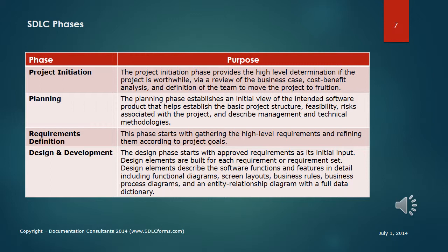Requirements definition. This is where you precisely define the business and functional requirements for the application, wherein the functional requirements document the inputs, behavior, and outputs. This effort in many ways is the most important phase of the project, for if you don't allocate sufficient time, personnel, and resources to this phase, the rest of the project may become a management nightmare. So make sure you have personnel who excel in writing these documents.